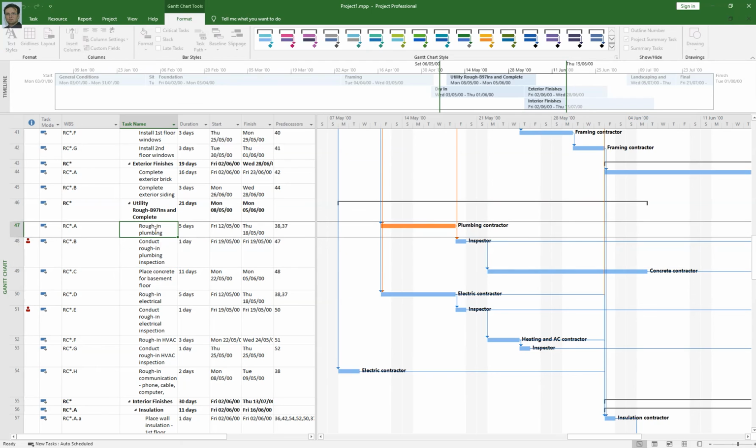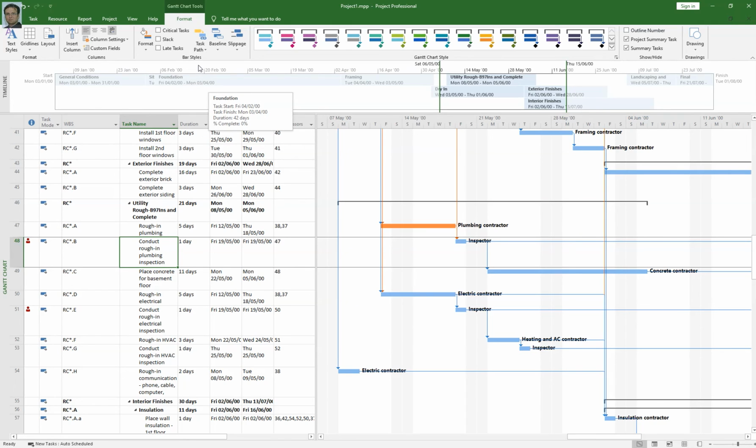So I will click this activity again. I will click task path and then I will click on the successor tab. When I click on the successor tab, it has changed the color of the successors to this activity as well. So this is how we can find very easily in this section the successors and predecessors of your activities out of 100 activities.